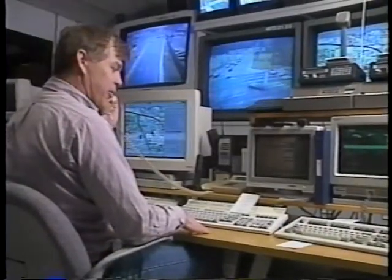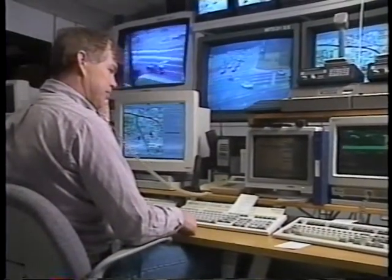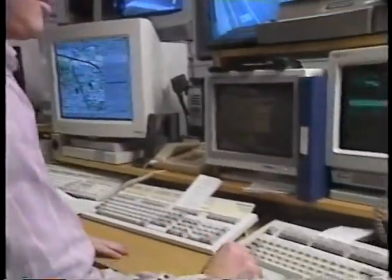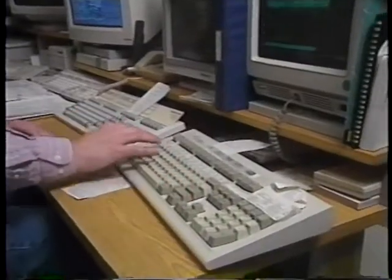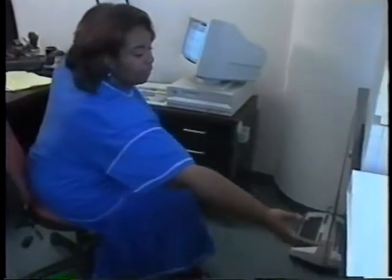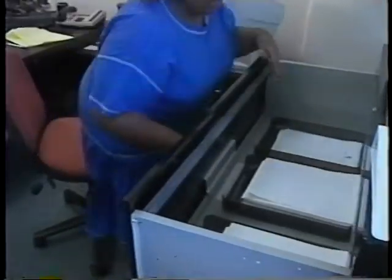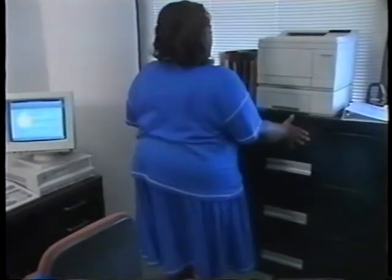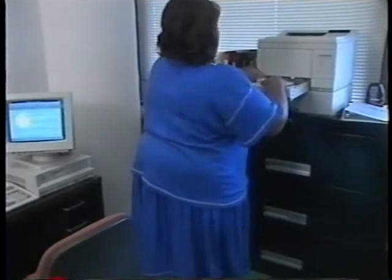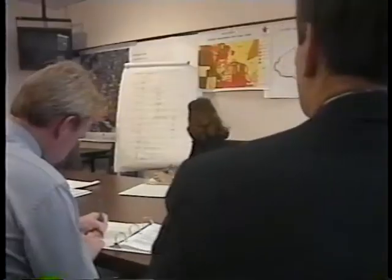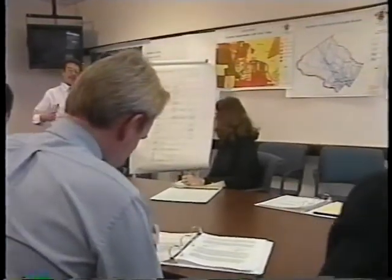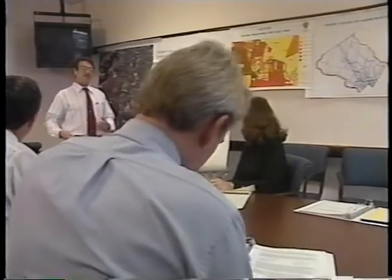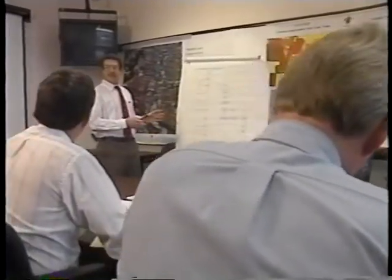Administration procedures involve contract administration work, such as processing and control of emergency work requests, especially with regard to safe traffic operation during the emergency, and internal documentation requirements. These procedures should be ready for the pre-work conference with the contractor. The agency staff must receive training in administration procedures prior to the work beginning.